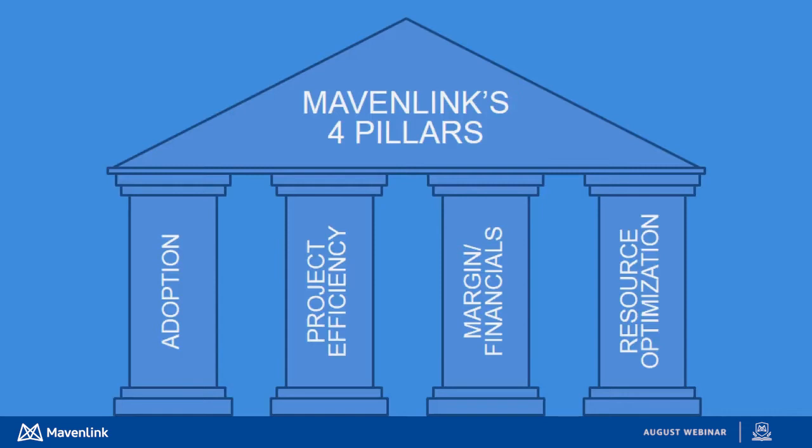More stats for you, kind of a side note. To maximize your return on investment, proper resource utilization dictates that resources should be, at a minimum, 75% allocated to projects.